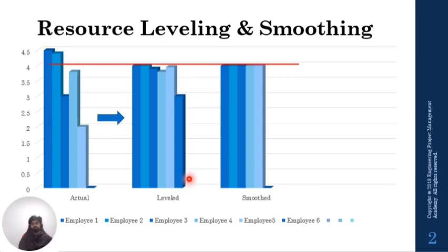One more important point is regarding the timelines. If the same amount of work is done in leveling, and you take the x-axis as the timeline, you need additional time to finish these activities. But in the case of smoothing, we reorganize the tasks of the colleagues in such a way that we still do it in the same timeline. So in smoothing, you don't jeopardize the deadline of the project, and you are safe.